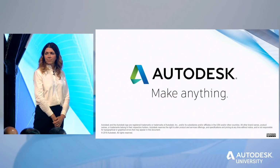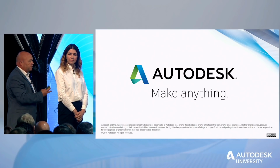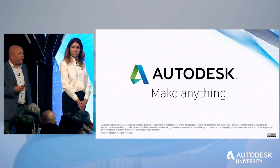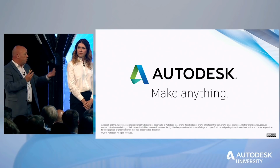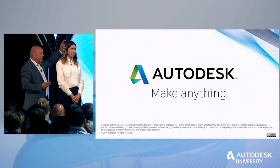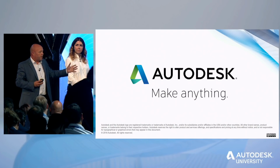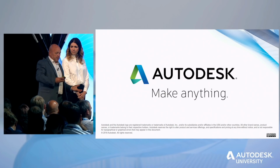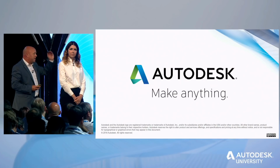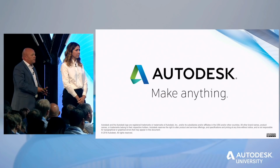So there's 2 areas here, because first of all, when we're scanning things, if we find a problem, we'll either have to bring that back into the model and redesign the model to make sure there's no issues with any of the services or coordinated assets around that area, and that'll start working as a workflow. The other area is if we find we need to design something, we have to go right back to the beginning of the process, redesign it in Revit, run it through all the clash detection, review process, bring it through a coordination meeting again, and then approve it for construction. You know, so we can't just make a change on the fly. It has to go back to that design partner who's managing it and bring it right the way through the process from stage 1, really, right the way to construction again.